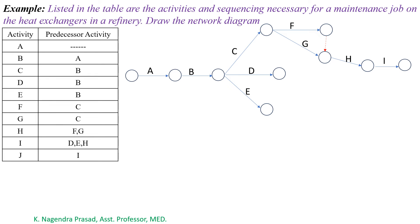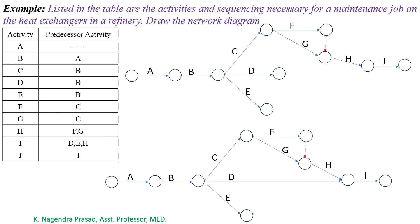Here, observe that activity H is only the predecessor activity for activity I. For this, we have to modify activity D. I is started after completion of H and D. Also, from the table, activities D and E are having common successor and predecessor activities, that is activity B and I. So here draw a dummy activity from E.